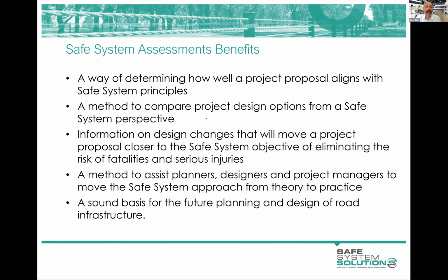It's also a great method for comparing project design options. And road safety audits are not something that you do that with. In fact, that's clearly stated in the Australian Guide to Road Safety Part 6 and Part 6A. It says a road safety audit is not to be used to compare project options. It's to identify the safety issues in each option, or the one that you're presenting. But it's not a comparative tool. A safe system assessment is, and that's a great use of it.